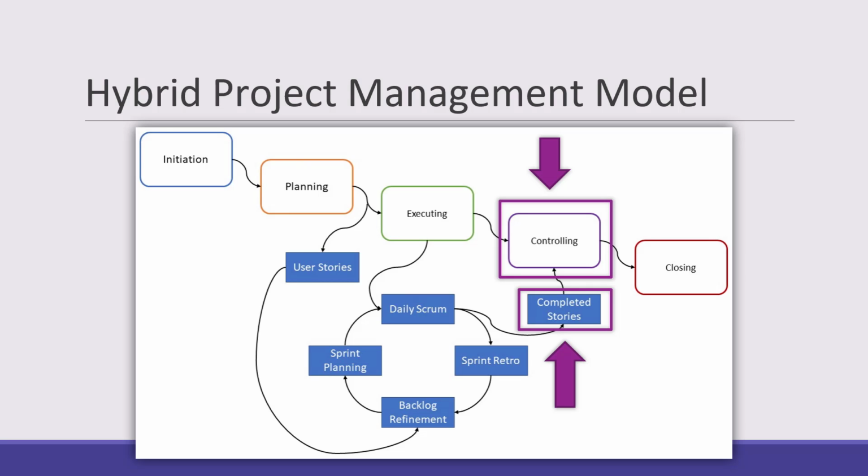Incorporating our agile project management components, the user stories are cycled through the Scrum Sprint process until completed and fed into validation. Depending on the organization, validation can be completed in a separate testing sprint, as a part of the development sprint, or in a waterfall fashion after the work has been completed in the Scrum Sprint.